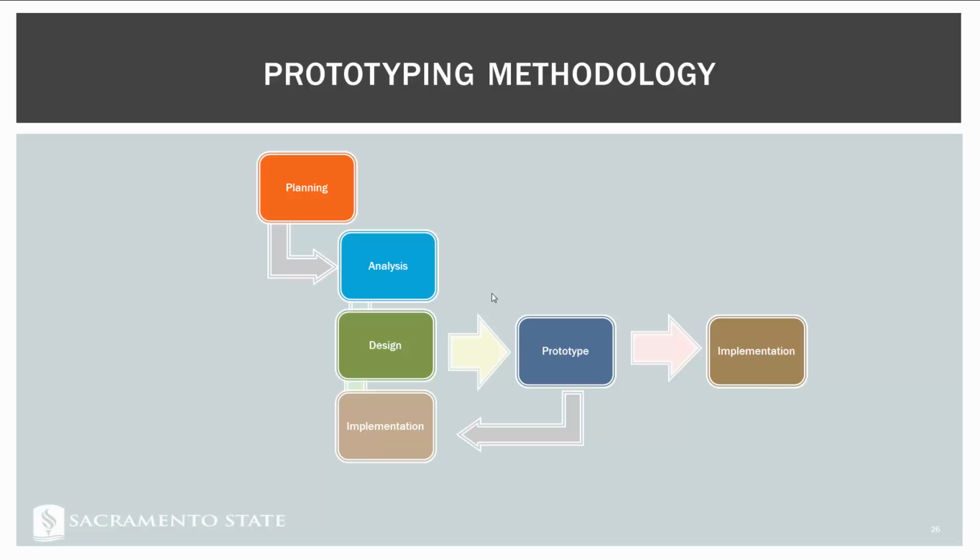The advantage of this is we tend to work out a lot of the problems as we're prototyping along. The disadvantage is that this may take quite a bit of time before we're ready to have a prototype that we're happy with and before we do any implementation. So, time is money. The longer we spend doing these iterations and figuring out our prototypes, the longer it takes before we get any benefits of our implementation.